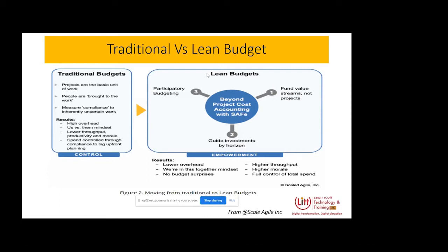And then we bring in the concept of the value stream. I will explain what a value stream is and what it looks like. So rather than having all these functional silos, where network is different, architecture is different, and the data team is different, embed all the respective functional expertise into one team and call it an agile release train. And for this agile release train, fund the PI planning. PI planning is 3 months, or its standard duration is 8 to 10 weeks. PI planning generally happens, and during these 8 to 10 weeks we estimate the features we are going to deliver.